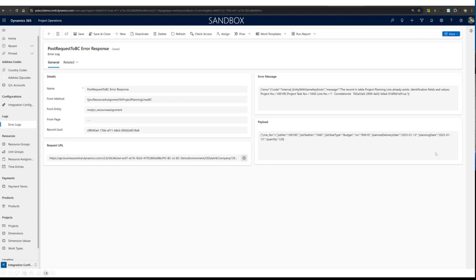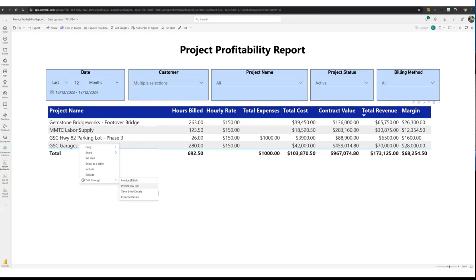That's the main integration. As mentioned at the beginning, we also have suggestive Power BI reports that can be embedded in Teams. One important report is the project profitability report — every professional services organization using Business Central and Project Operations wants to look at project profitability. This report shows all projects with total expense costs incurred against contract value, and you can drill through to see all invoices, identifying which projects are profitable versus which are not.